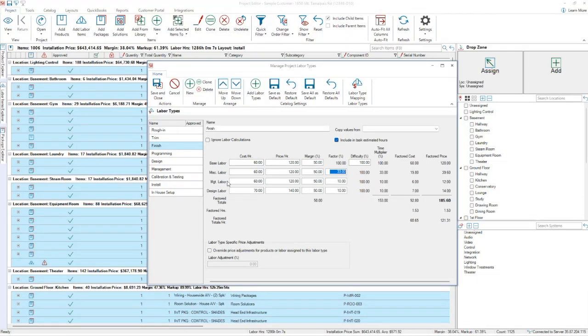Let's say I have 10 technicians in the field and I have 1 project manager, well, that is a ratio of 1 to 10, or 10%. That's where I come up with a number like that. So, if I have 10 techs in the field and I am trying to schedule 40 hours a week for them, that is 400 hours. And at the same time, I want to sell and be able to schedule 40 hours of project management. That 10% factor gives that to me.